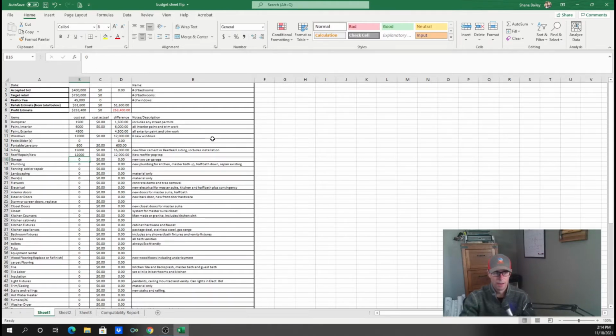Now the garage is going to be a little bit different because this is actually going to be an ADU. Like I was talking with Angel when we were on site there, building the detached garage in the back towards the alley, but also potentially building the second story carriage house ADU type scenario. But don't put stairs in, because if we don't put stairs in, then it's not actually going to have inspections yet. We're just going to frame a structure with no livable access. It'll just be framed out.